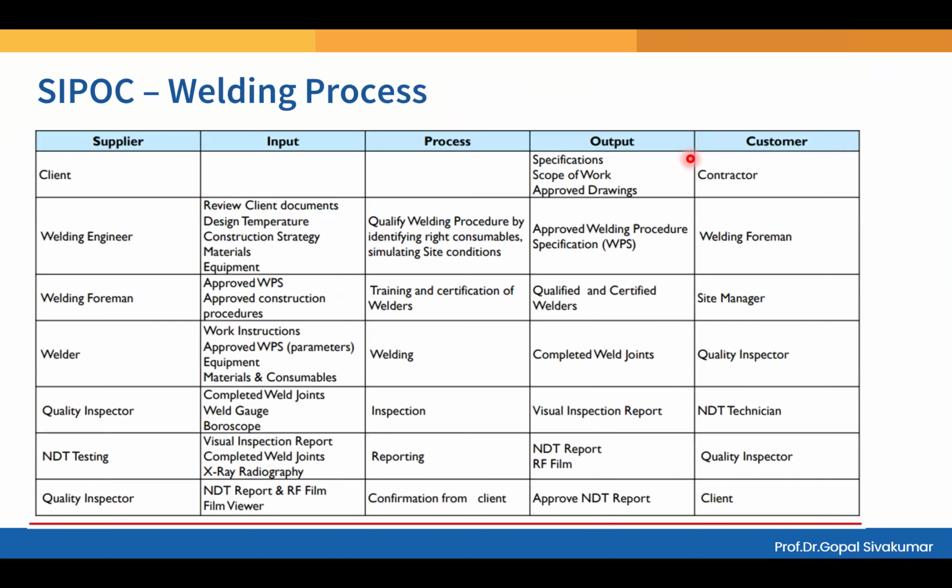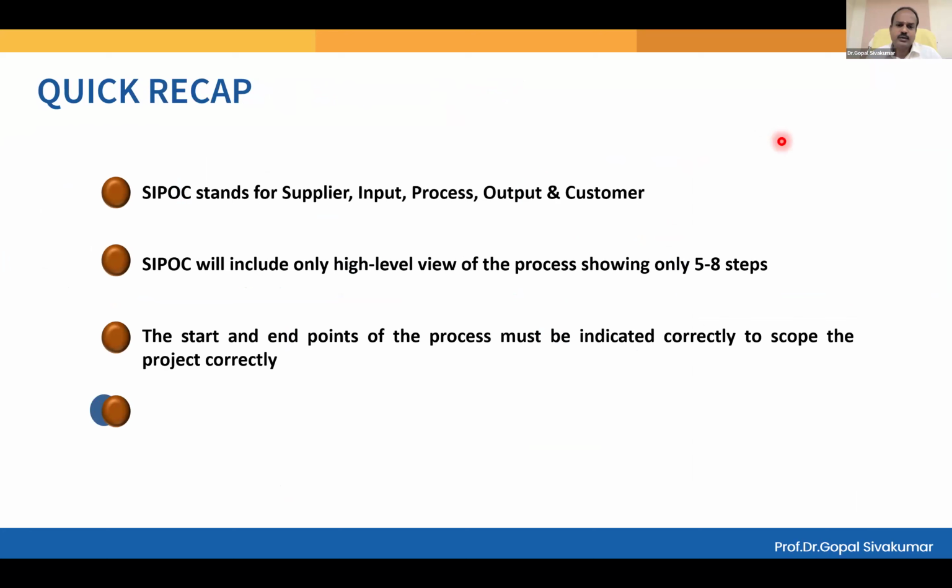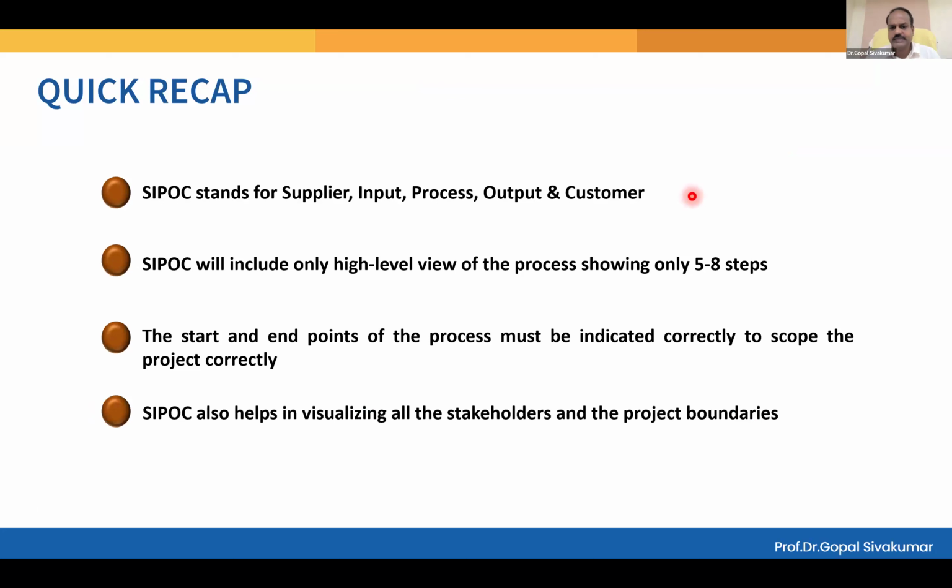Now the point is, how can you create a SIPOC for your project? You remember for the welding project, the SIPOC is now available here. These steps are related to welding, and you don't have to show all the steps. Always, while creating a SIPOC, show only 5 to 8 important steps, not all. And now, what I expect you all to do is create a SIPOC diagram also.